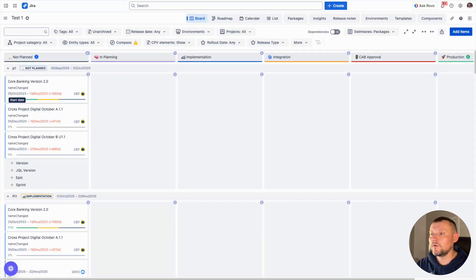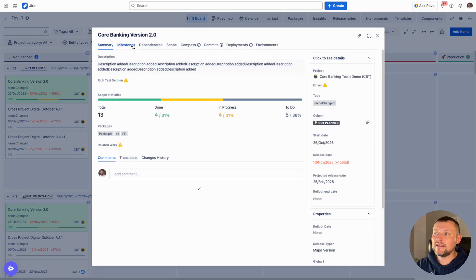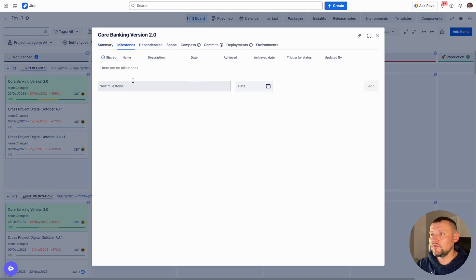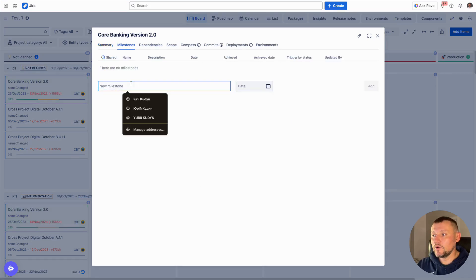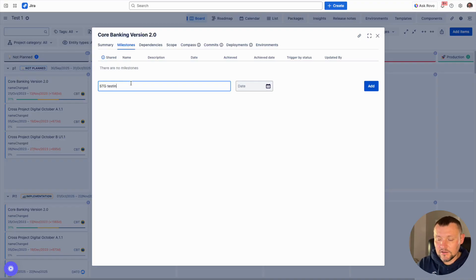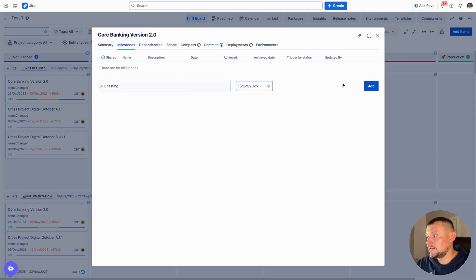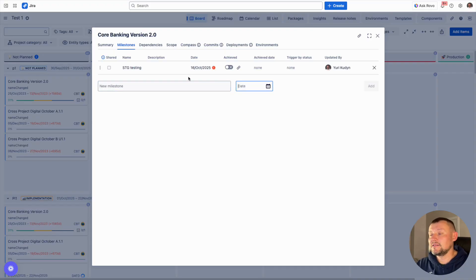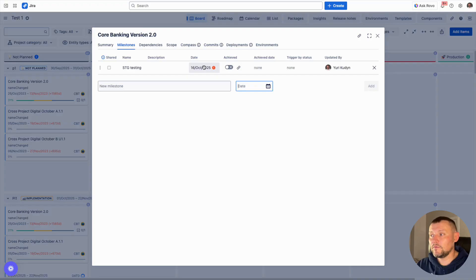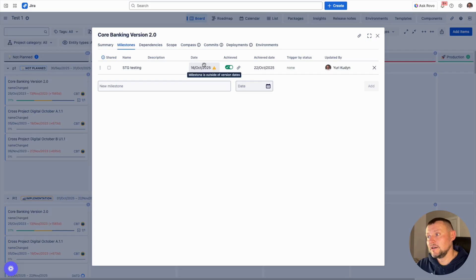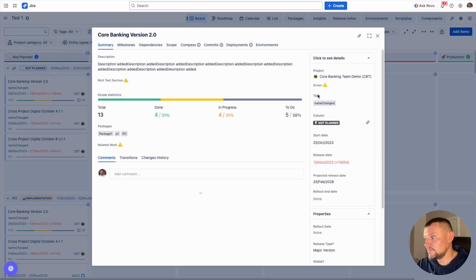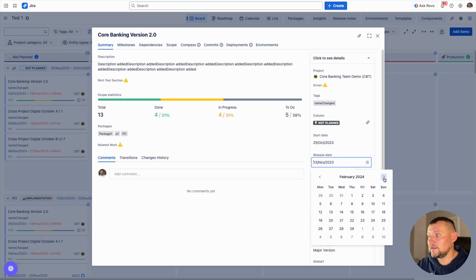As a next step, we can move a level below. For each release, we can define intermediate milestones representing events on the way to releasing the version to production. We can define milestones such as staging testing, set a date, and define a milestone as a key event like a demo or integration point. For each milestone, we can define a target date and see if it's been achieved or not. We can also see if a milestone is outside our release boundaries, so we can always track if we are in good shape.